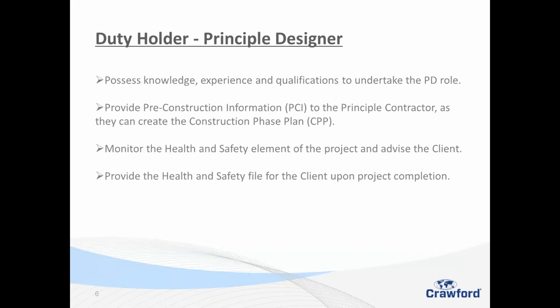We must provide pre-construction information to the principal contractor. We do it as a pack to ensure that the actual contractor has as much information as possible. We must monitor the health and safety element of the project and advise the client if there's anything that they need to know. I find the relationship with the contractors is the most paramount thing that we actually do.